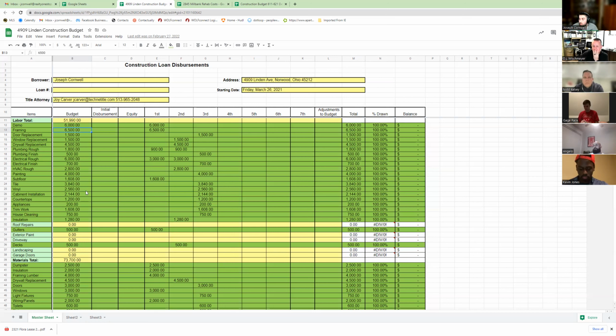If they're standard windows, meaning 101 united inches, corner to corner, if they're 101 united inches or less, that is one size for material and typically labor. If they're bigger than that, the cost goes way up. Like I had to put in a triple mold, they call it, meaning they're fixed together in the factory. A triple mold, basically three windows together, and that was a $2,000 window. But those individual windows might have only been $600 if that wasn't the way it was built, if that makes sense. So there are some variables, but as a general rule of thumb, $500-600 a window is a safe number.